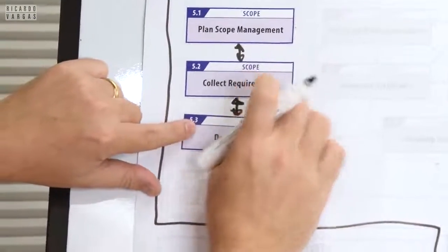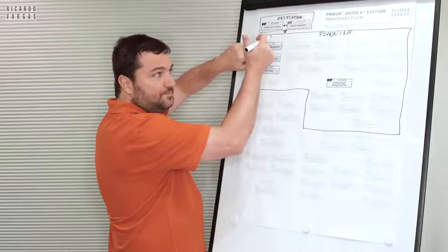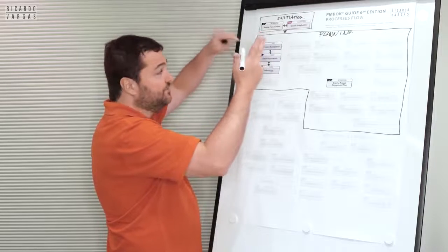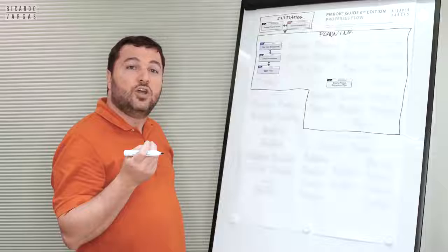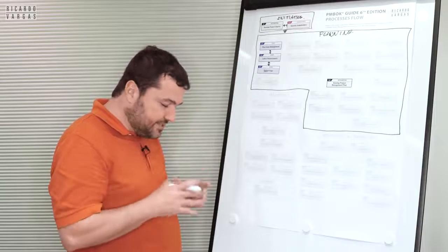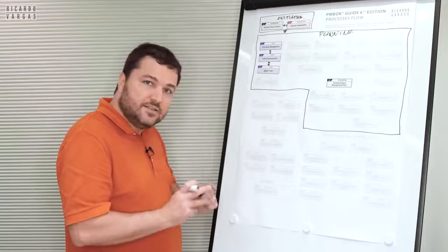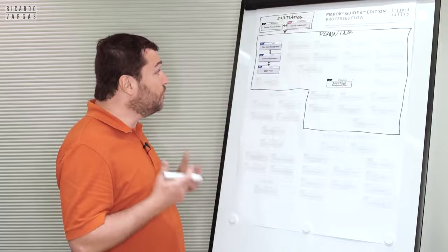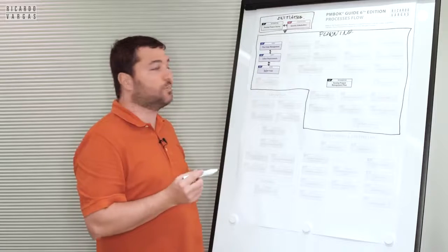Basically, you need to combine these requirements, functional, technical, and activities and parts of the work, and you define the scope. Basically, you produce one document. I don't like the word document because it seems like bureaucracy, but you produce something that reflects the scope of your project, and we call this the scope statement. So the scope statement will define how you want to approach your project.